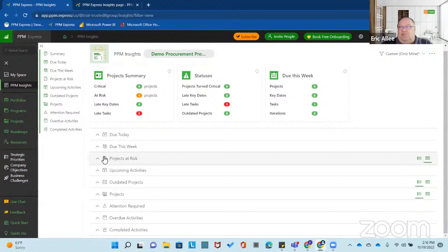You can even use those numbers to project ahead. Within 1 day of something, you would use a -1, right? So it's due tomorrow. Okay, well, that would be at risk if you put a -1.